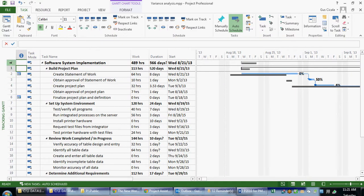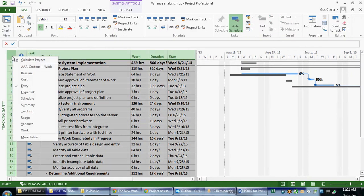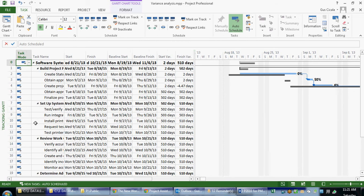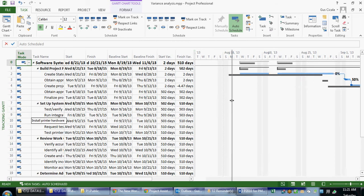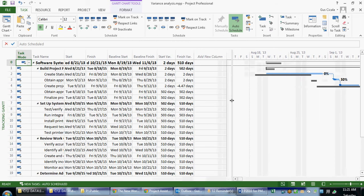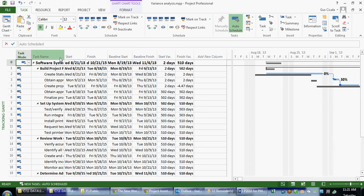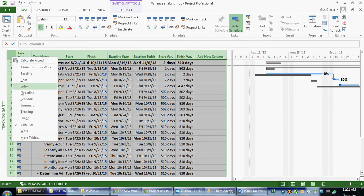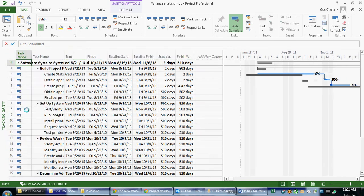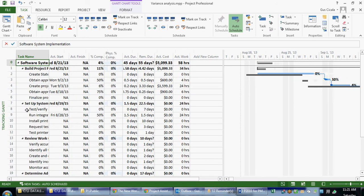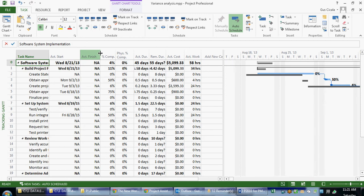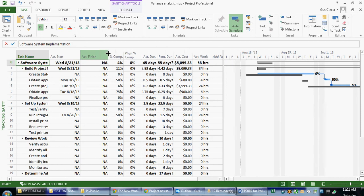If I apply the Variance table, I can see which of my tasks have variances. If I apply the Tracking table, I can actually put in start and finish dates. So here we see some actual start and some actual finish dates.